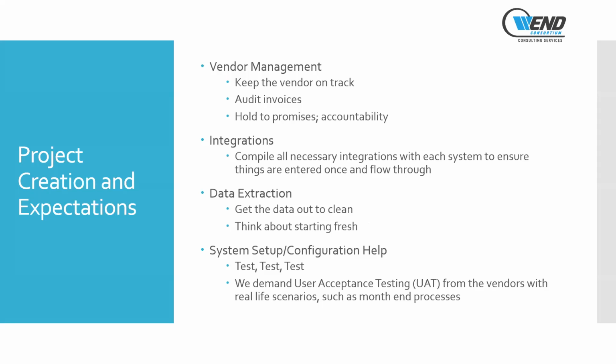When you get done setting up and configuring your system, test. Always test your system. Always make sure that the scenarios and processes you've identified through the technology selection process, you run inside your new system with your data. Always demand from your vendor that user acceptance testing, so you're hitting those real-life scenarios and things like month-end processes, closing out your books, putting invoices in, billing customers, all of the things that make your operations run.